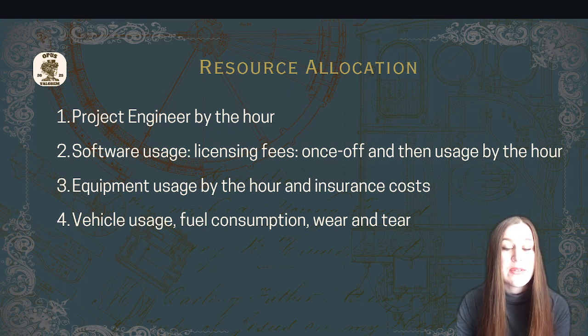Each and every one of these resources has a rate associated with them and time that increases the cost. You should know which resources are to be used in the project and ensure that you stay within the time limits allocated for these resource allocations. For instance, using SolidWorks for longer than the project phase stipulates may cause a backlog in other project progression, which causes delays, which are costly.